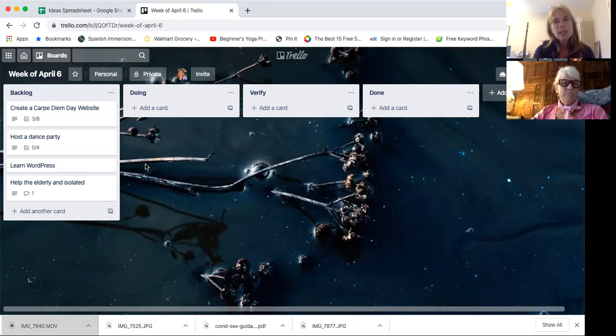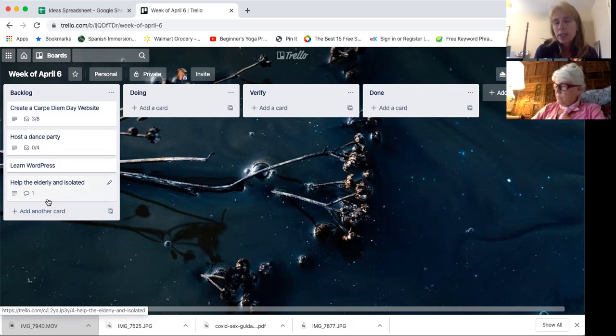But an iteration is a time block, what we call a time box. So it is very much time-based. But these things that we're doing, in Agile lingo, we usually call user stories. They're stories that define what we're going to do, and they're very specific. One of the reasons they're user stories, which we'll get to in maybe our next class, is that we want to really understand why we're doing these. Who are they for? Who will they add value for? Ideally, that would be the person who would be giving us the feedback at the end to see that we really did add the value that we meant to have.